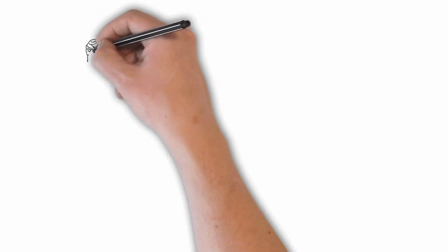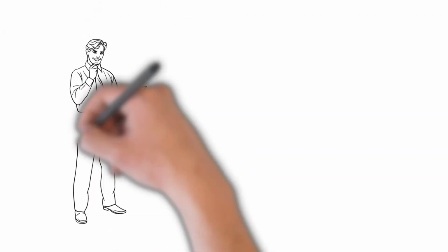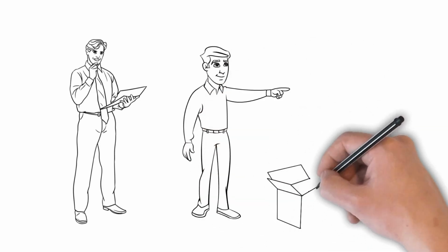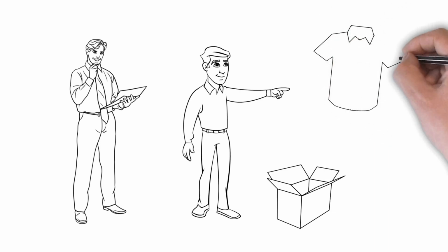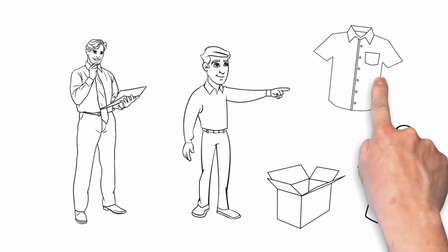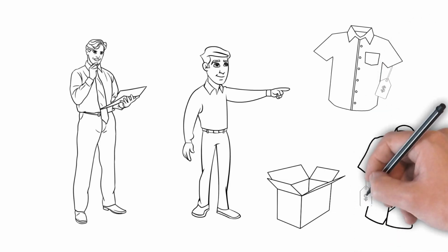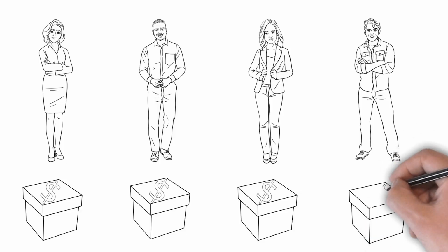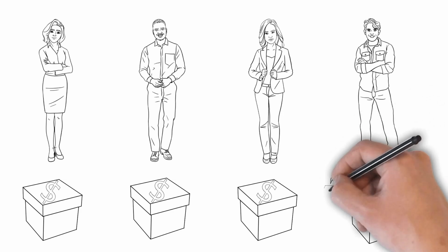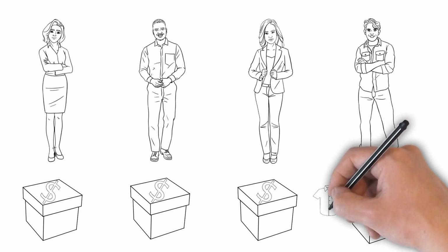But the design build contractor is going to say, you know what? I'm happy to go shopping for you, but let's work together on this. Before you commit to using me, let's go together. Let's go shopping. Let's pick the items that are going into the box. Let's talk about the cost of the items that are going into the box. So you know exactly what's in the box. And as those items go into the box, we can talk about the cost. So now when you line everybody up, you've got numbers, but you actually know what's in one of those boxes.